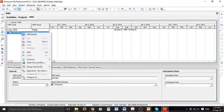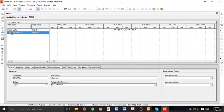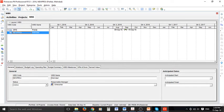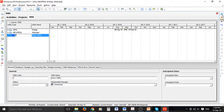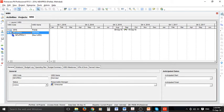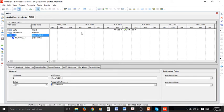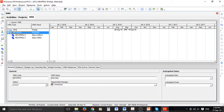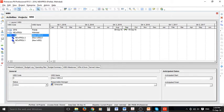So let's check if there is anything here. The way to create work breakdown structure is to work with the add button in the left hand side menu. I can press that and it creates the first level of work breakdown structure for me. So in this project I want to create three work breakdown structures.